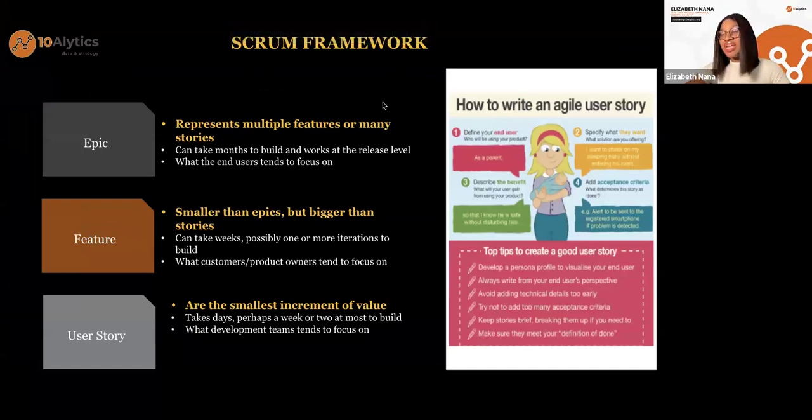So let's talk about epics, features and user stories, because you can't move on to JIRA and start writing user stories if you don't exactly understand what epics are. An epic is a large body of work. It represents multiple features or many stories, and they can take months to build. It also works at the release level. The epic is what the end user tends to focus on.